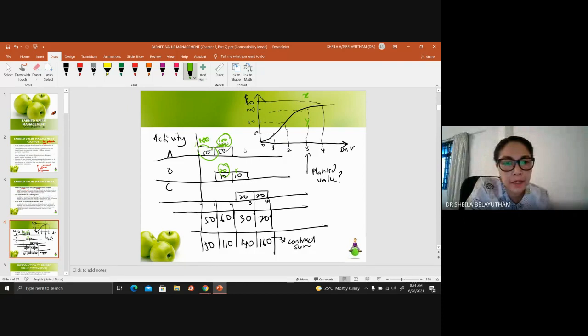It cannot mean anything, right? When it's only cost, then it's cost. The cost does not mean I have spent 100 ringgit, it shows that my performance is good. Betul. So in terms of performance, you cannot assume that I have spent more, I have completed the progress more. I have completed both of the progress in that week. You cannot be so sure based only on the cost.